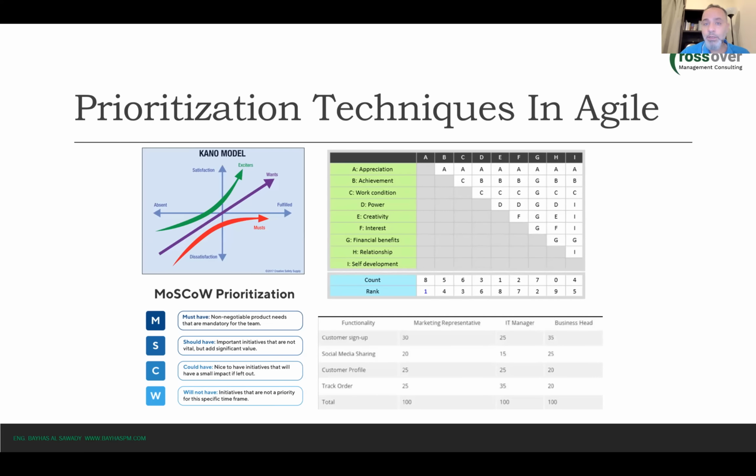So we started by the deliverable that we want to reach at the end of the project. And then we broke down, we did a decomposition, right? We called the tool the decomposition. So we decomposed the deliverables until we reached a level that is sufficient and necessary in order to cover all the requirements and all the work that we need to do to create the deliverables.